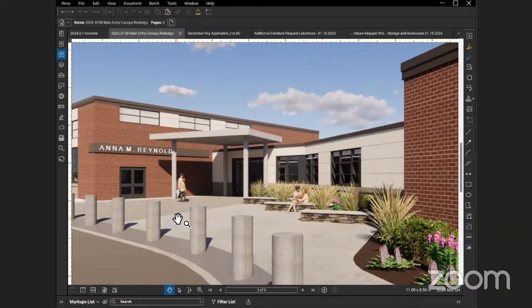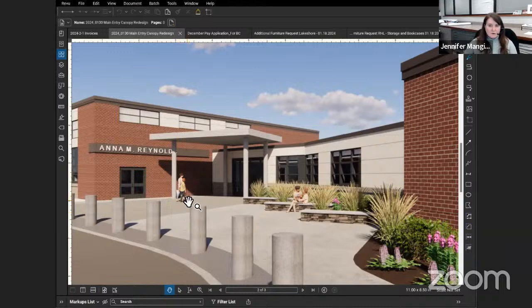It is something that we could look at, what it would look like and if there would be any impact on the piers that are already buried in the concrete to support those columns. Because at this point, extending it to provide coverage at the cafeteria door that you see would be an even greater cantilever, let's say. We don't want to open up the ground again and rebar and go down so deep with additional concrete piers. We put the 4 in. So those column locations that are shown are pretty much fixed. So I can ask and see if structurally that cantilever could happen. I can't make any promises without us looking into it.